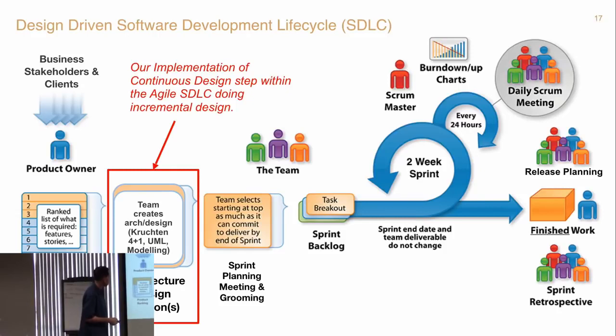This is how it kind of works. As you've seen here, this is actually our life cycle at Capal. When I first came to Capal, it was a 1-week sprint. That's kind of tough. And as I came in, 70% of the points would roll over the following week. Sound familiar? Yeah, we've created a new waterfall. Roll over. It was a real problem.